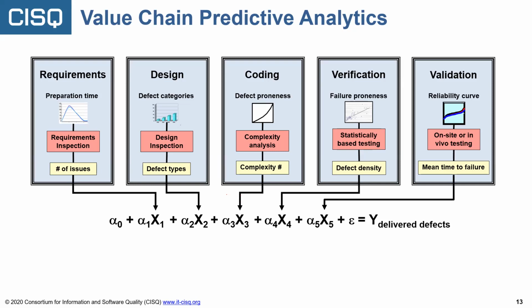And sometimes I'm looking at this equation and all I've done is requirements inspections and design inspections. And so I'll only have basically two parts of that data. And so it won't be as predictive, but it'll still give me a general idea. Am I on track? And if not, what's wrong? Were there a lot of bad requirements? Were we missing lots of requirements? Did we make some serious mistakes in design that people were coming up with?